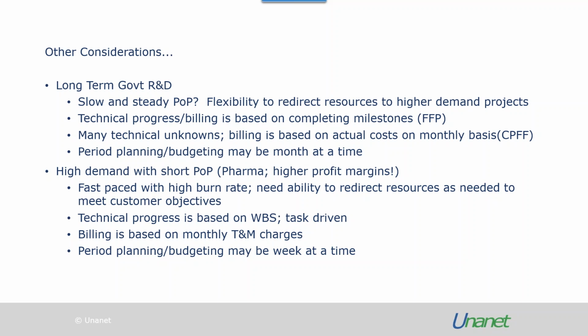In contrast, the high demand projects with a shorter period of performance in the commercial sector tend to be fast paced with a higher burn rate, and we need the ability to redirect our resources as needed to make sure we meet the customer's objectives. The technical progress this time is based on a work breakdown structure, where the billing is on monthly T&M charges, and the period planning tends to be a week at a time.